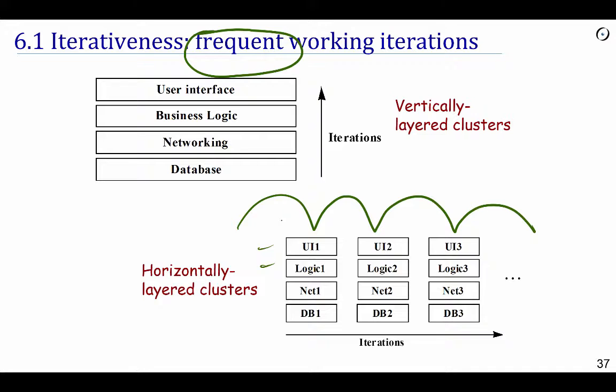In my work, we have adopted iterative development, and the period is 1 month, 1 calendar month, because it makes it easy to remember the January release, the February release, and so on. But in agile projects in general, it varies, sometimes down to 1 week or even 1 day in the more extreme forms. The emphasis is on having frequent iterations and frequent partial deliveries.